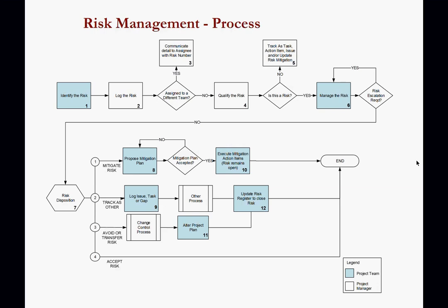Okay, now, the risk itself is very high. Like the Mayor's laptop not being available is very high. Let's manage the risk. Do we need to escalate this risk? Yes, we need to escalate the risk to Madam Mayor, to say, Madam Mayor, if your laptop is not available, you are the sponsor of this particular project, there is no way we'll be able to finish this project in the 10 days timeline that you've given to us.